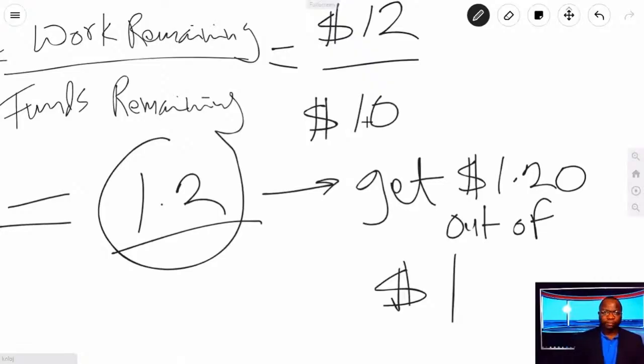And they'll tell you to come clean. Coming clean means just ask for more money. Tell us how much that money is, or tell us how much you're going to be over by. It's better we prepare for it than we just arrive at the end of the project and there's this big old blow up. You see, that is the use of TCPI. In my opinion, it's a lie detector test.